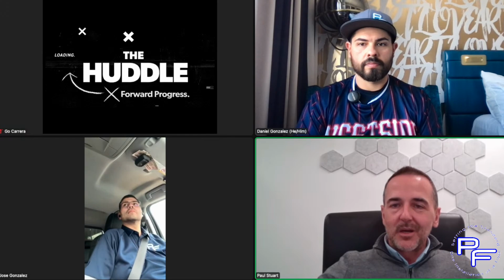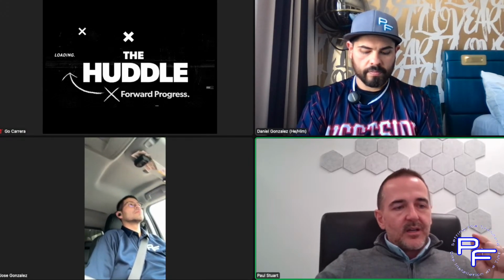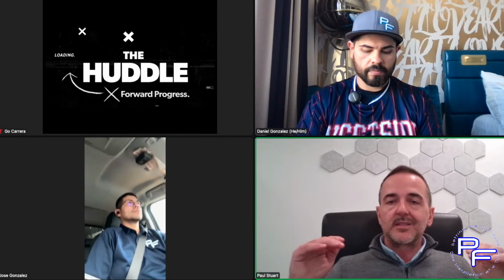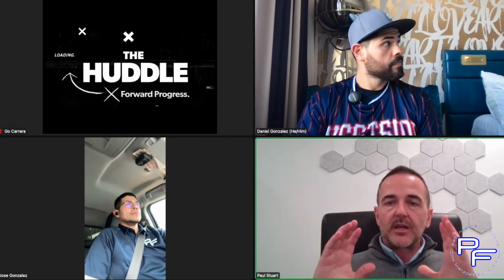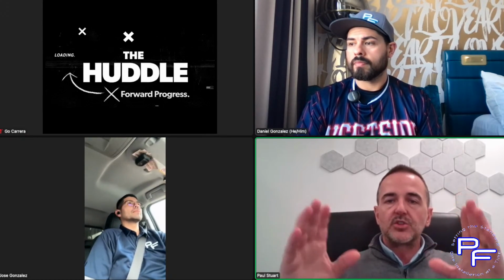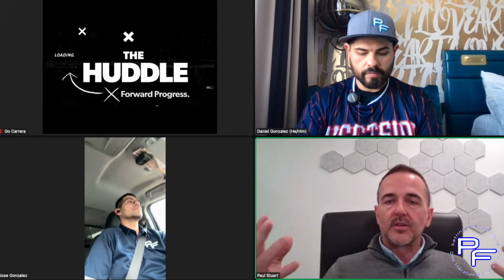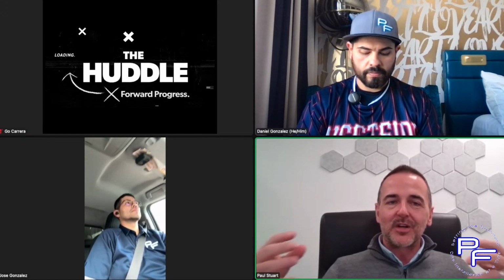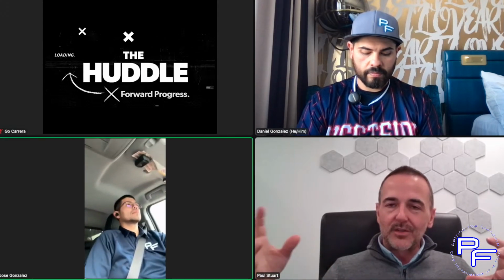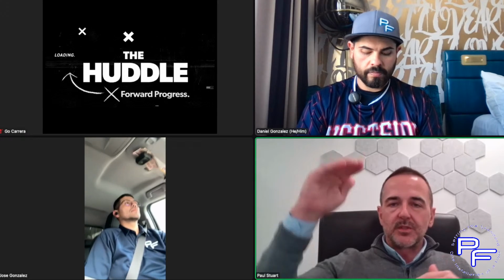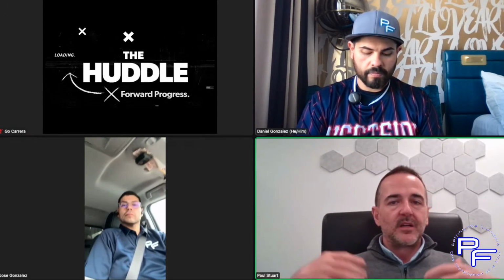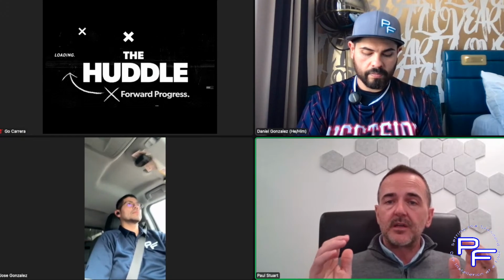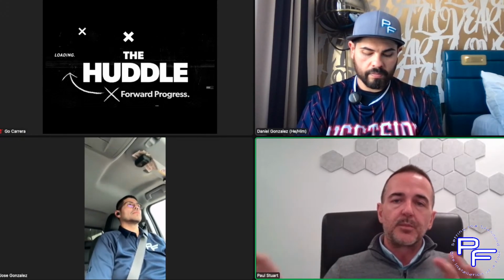I'll just kick it off with a couple of things. One is when we're sending out proposals to our general contractors, we try to have consistency from an image and data delivery standpoint. So our bid proposal forms are all the same. They're written in a PDF format so that the different estimators or project executives sending out bids can't go off the rails too far, so the format of the proposal is always the same. It always has our project notes, our job-specific exclusions, and then our standard exclusions that apply to almost all of our projects.